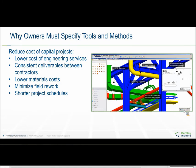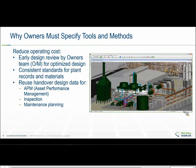That same material data captured to support procurement will help in operations and maintenance if we're able to bring this information into our plant records, complete with part numbers and tied to storehouse and spares. Clash management and design reviews earlier in a project minimizes field rework and involves operations and maintenance long before the designs are final. The results are clear: that technology saves engineering costs, construction and material costs, and shortens schedules, letting owners begin plant production earlier. But maybe more important than these savings is the impact of good plant records on constructability and operations of the facility. Finding accurate information in a consistent format can be the difference between an appropriate operational change and a costly unplanned shutdown.